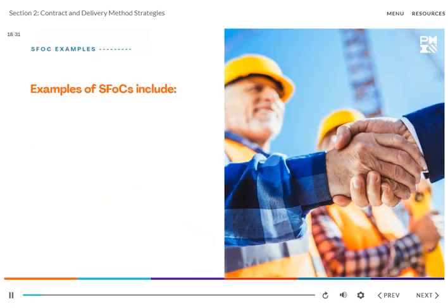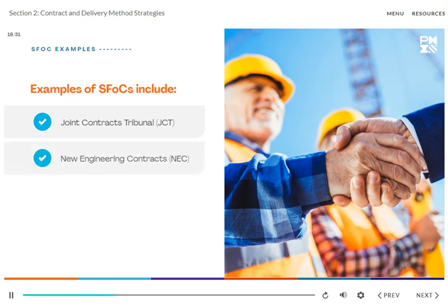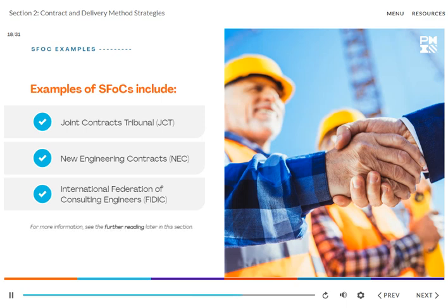Examples of SFOCs include Joint Contracts Tribunal, or JCT contracts, New Engineering Contracts, or NEC contracts, and the International Federation of Consulting Engineers, or FIDIC contracts. More information on these and on the complexities of using bespoke contracts can be found in the further reading later in this section.